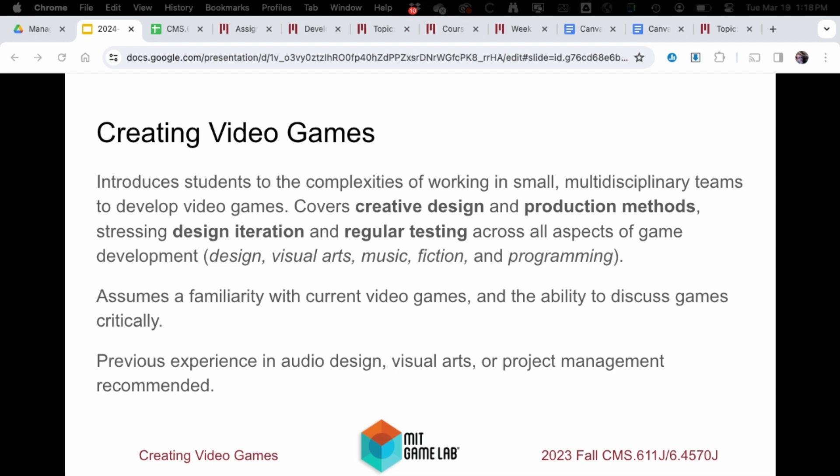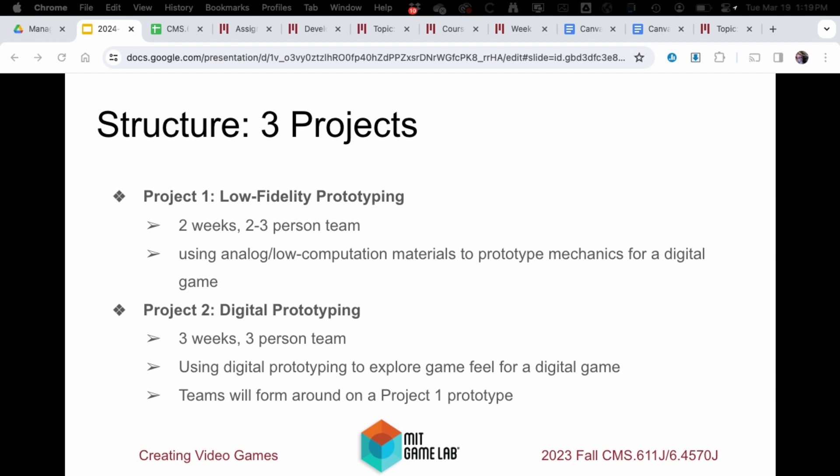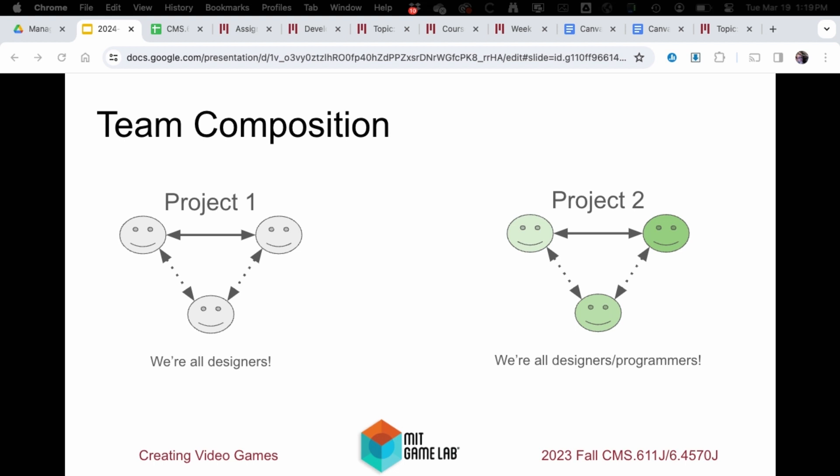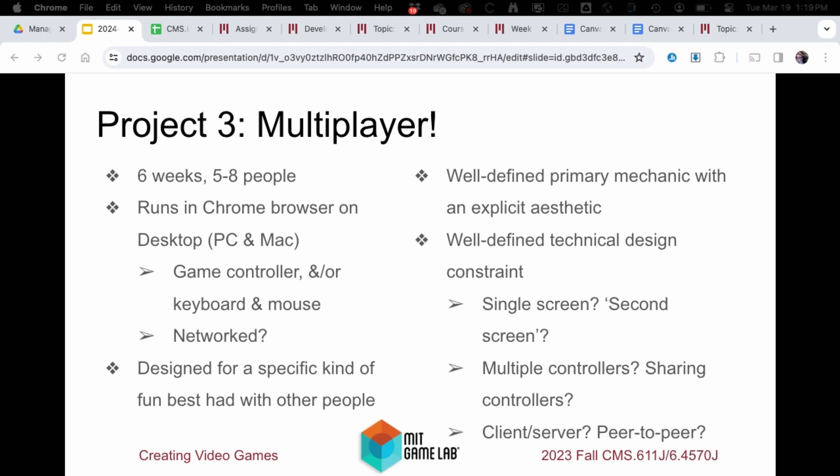The course is primarily about project management for creative software projects, but it's called 'Creating Video Games' because we're not going to get students to come to a project management course. We're getting students to form larger multidisciplinary teams — for many of them it's the largest codebase they've worked with and the largest team at MIT. It's a project-based course with three group project assignments that build on each other. The first two team assignments are small — two to four students making low-fidelity prototypes, then a digital prototype. The last assignment is a larger team of five to eight students making a digital game based on common constraints; this past fall it was multiplayer games.